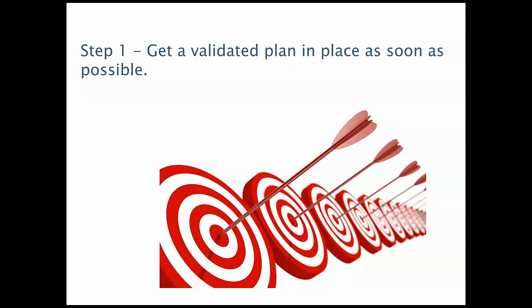The second important thing about that period, that's usually one of the least documented periods of a project. In a lot of cases, just as I mentioned, the initial schedule goes unapproved for a long time, and therefore the contractor doesn't update it. Therefore, you don't have a very good documentation in place for that period of the project. So it's when most issues occur. It's usually the least documented period of the project.